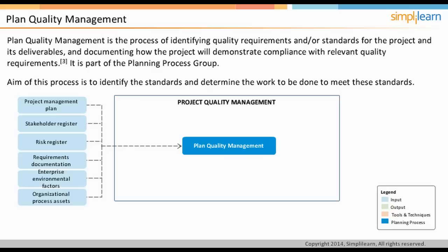Standards from within the organizations are usually the best practices learned over a period while executing numerous projects. An example of government standards can be standards to control air pollution by the motor vehicles, which vehicle manufacturers must adhere to. To accomplish quality planning, first, analyze the benefits versus the costs of meeting quality requirements.